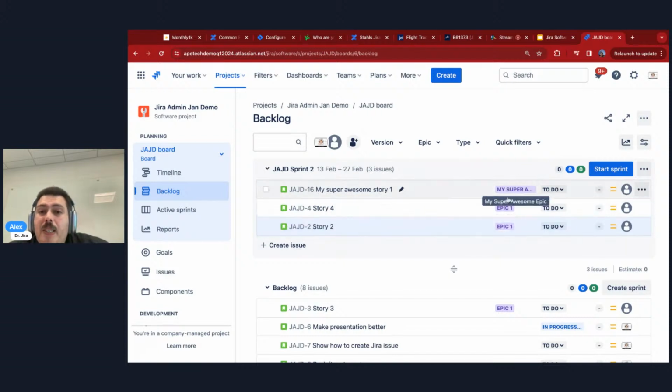You're going to see the epics that they're associated to. You're going to see the statuses. And we have this concept called the story point. So each of these items, and again, this is an agile thing, each of these items should be estimated. Your team should figure out a level of effort on how much time it's going to, not time, but how much effort, time and complexity, or if you're a pure agilist, complexity only, how much effort is your team going to have to put into this, right?